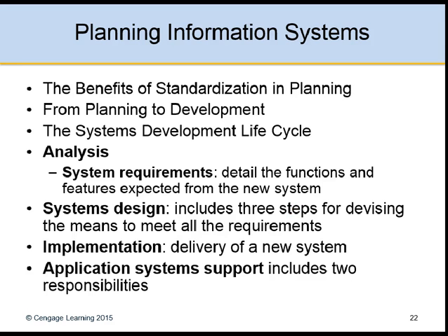Application systems support. This includes 2 responsibilities: maintenance, which is post-implementation debugging, updates, and adding postponed features, and user help. Maintenance comprises up to 80% of IS budgets. Support is the longest phase of the system lifecycle. Effective maintenance requires good system documentation during development.